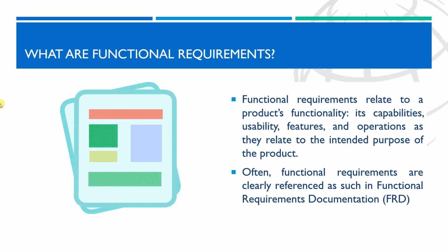Depending on the size and scope of a project, you might decide on a milestone between the statement of work and functional requirements documentation. In this case, some teams create business requirements documentation to provide a formal midway sign-off for all parties. This presents the opportunity for the project manager to confirm the team is heading in the right direction before getting too far down the road with deliverables.